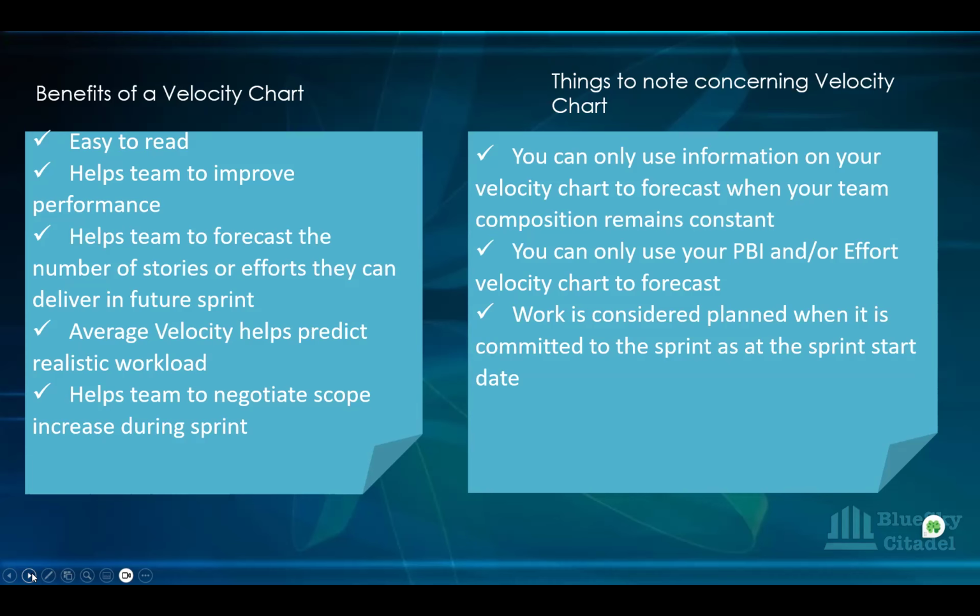Now, during the festive period, half of the team members have gone on holiday and we have the sprint planning. We're not going to take 80 in because half of the team members are not in. So realistically, you're looking at half of that velocity, because that is the capacity you have at that particular time.